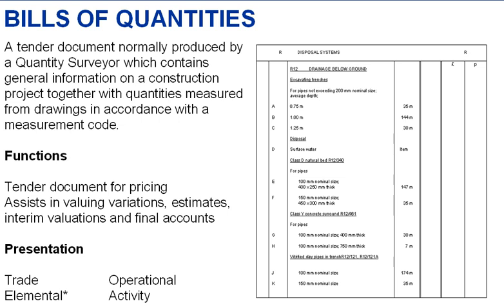A Bill of Quantities can be presented in numerous different manners. One would be on a trade basis, where each of the trades are taken out and measured as individual items. Second would be on an elemental basis, which is a standardization of a cost control procedure. And thirdly, we have the operational activity basis.